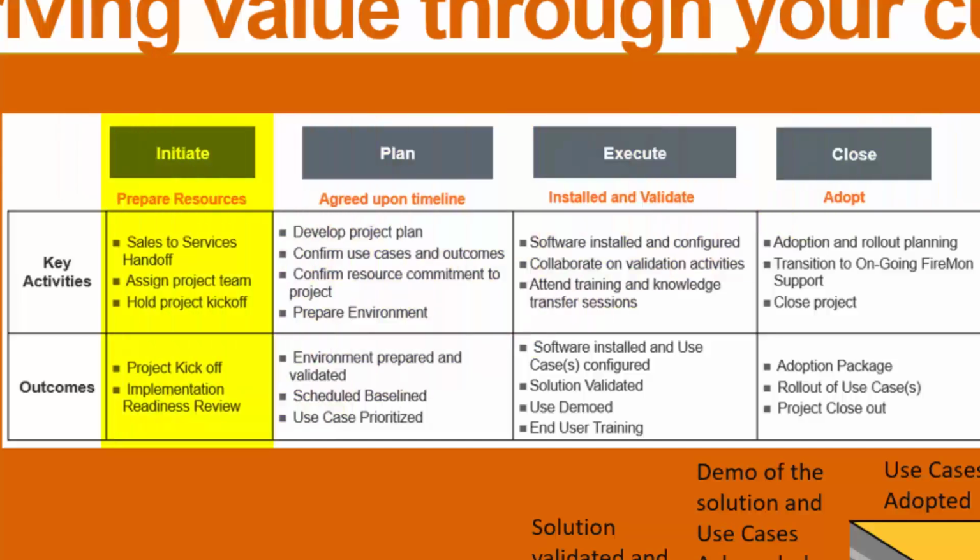In the initiate stage, your assigned project specialist will start with an internal meeting with the sales team for alignment on what has been discussed prior to implementation. The customer will then receive an invitation for a kickoff meeting to go over the architecture, logistics such as project leads, project managers, and any other groups involved, as well as expected tasks, milestones, and outcomes.